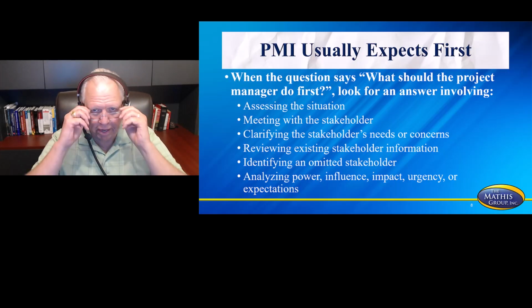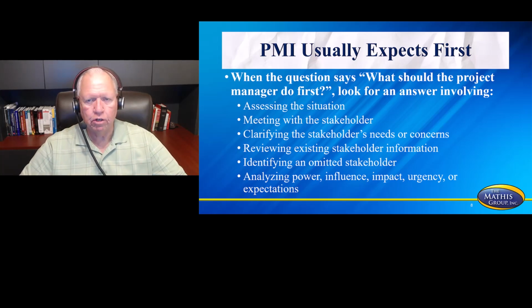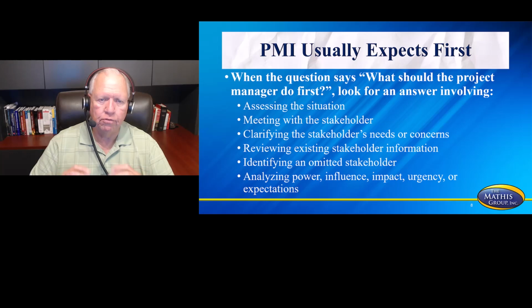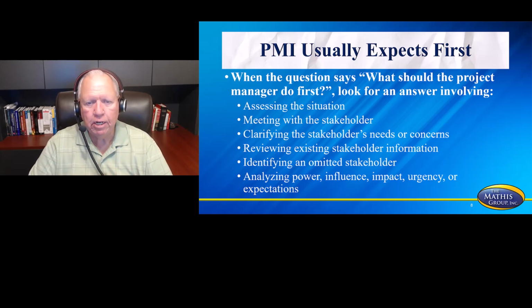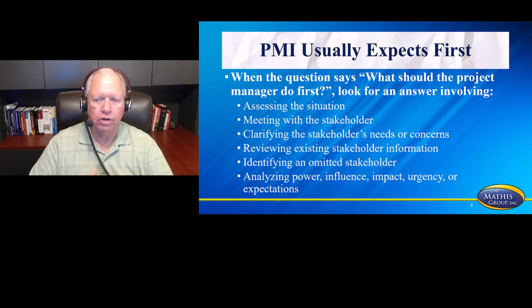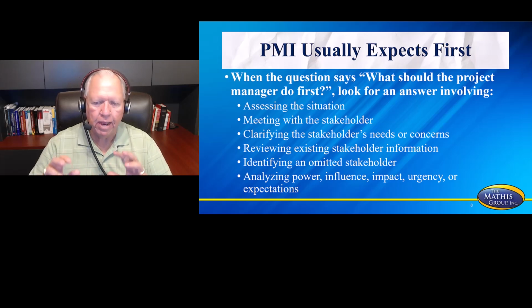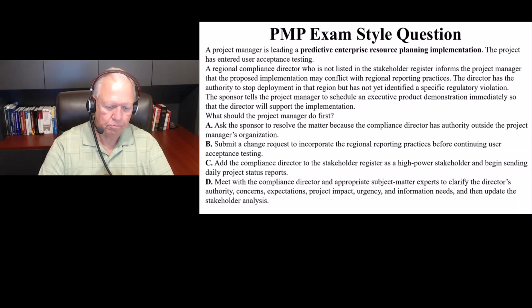PMI usually expects us to do certain things first. So when the question says, what should the project manager do first, or what would you do first, they're really not talking about action. Look for an answer that involves assessing the situation. Assessing, and then meeting with the stakeholder, clarifying the stakeholder needs or concerns, reviewing existing stakeholder information, identifying an omitted stakeholder that was forgotten, for example, and then analyzing the power, the influence, the impact, the urgency, or the expectation.